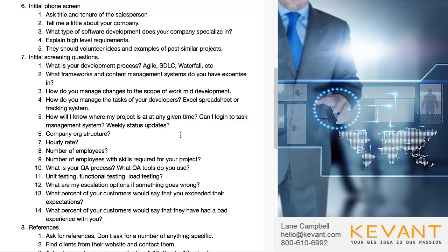And it should be at least a one-pager that they send you to say, hey, here's what we're working on, here's what we're working on next week, here's what we've accomplished this week, and so forth, so that you can make sure that the project is moving on at a steady pace.